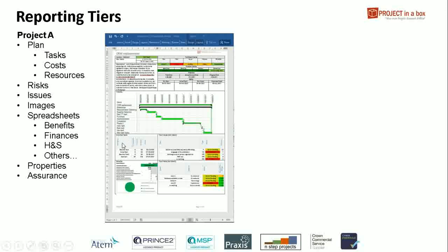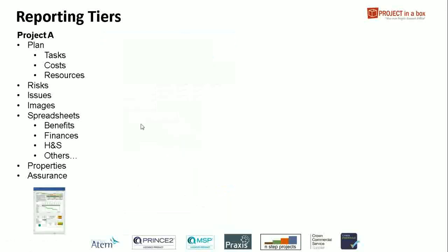We've got a list of overdue tasks. We've got a list of significant top 5 risks and issues which are not yet closed, ordered by one of the columns in the data. We've got some key stats or statuses about the technical aspects of the project: plan, risk, issue, finances, benefits. We've got some process status about which step of the process we are through, some costing information, some dates, baseline dates, etc., commentaries, and that's bringing our project statement, a one-page summary, together. So that's going to be generated at each project, as can other reports of that type.